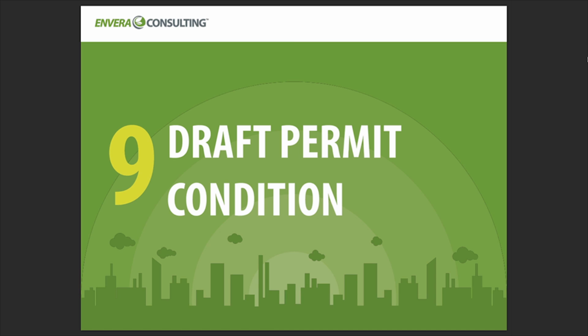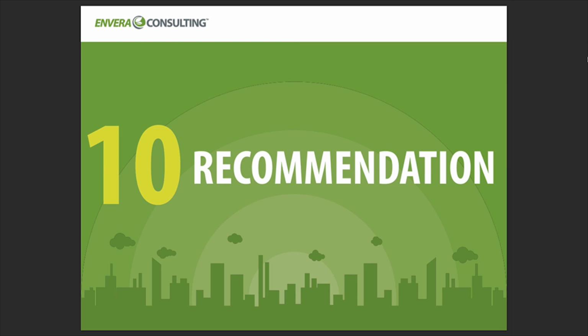Now, before closing on this 9th section of the evaluation, I just want to note that if you're going to keep records, be sure that maintaining those records and generating those records are not going to be a problem. If you're going to propose to monitor a parameter, be sure that the monitor equipment is already installed or can be installed without a problem. Whatever the case, you just want to be thinking ahead of how compliance with these draft permit conditions will be demonstrated. And then lastly, number 10, you want to make a recommendation to the AQMD to issue the permit.